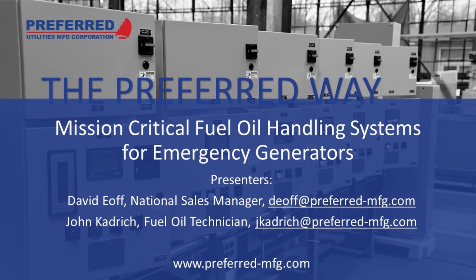John, can you think of any place else in the country where you need local knowledge to design a fuel system? Most of the places we deal with, we try and get a hold of the local fire departments or inspectors to find out what their requirements are, because they're always changing. And that's one of the big things we tell people: talk to these people to find out what they can do, because a lot of it's not in writing. You're looking at very old information.